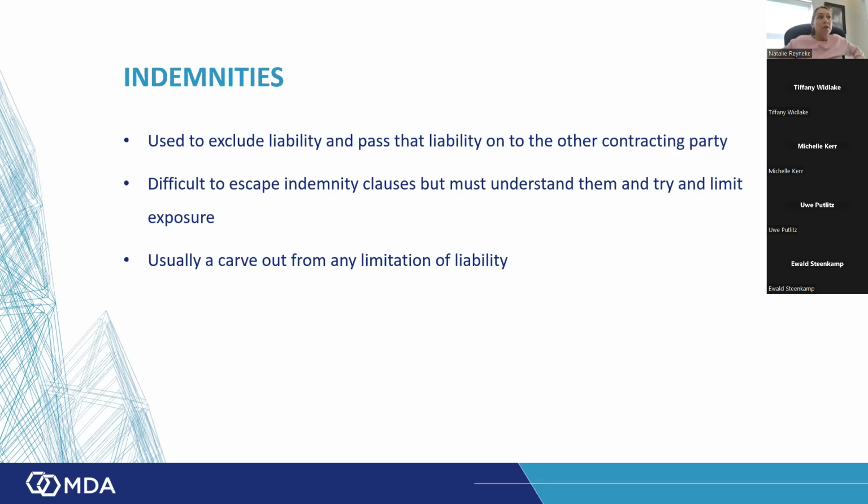And I think when the insurance companies were batting it out, the courts actually held that the indemnity in the JBCC is so strong that whether the contractors are negligent or not, the employer takes the risk in loss or damage to that structure. So that's not found in your other standard forms of contract. So when you come across an indemnity for loss or damage to existing structure, just understand that that's the basis for that indemnity.